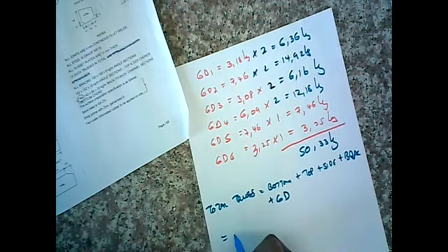9.33 tons. And what have we done? We basically quantified what 13 of these would weigh. Right, so let's end this example with a bill of quantities. Right, and putting all that just calculated into a form that we are putting into our bill of quantities. Right, so let's look at the bill of quantities. Let's say B of Q.